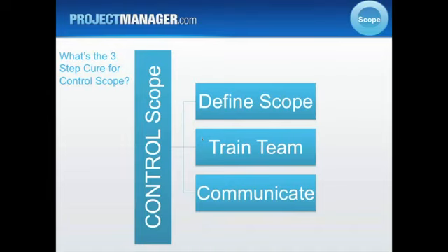Okay, good catch, because that was on one of the first screens. So it is important to distinguish the difference between the product scope and project scope. The product scope is talking about the features and functionality that characterize the product, the service, or result, whatever you're delivering from the project. So again, the features and functionality of the product, service, or result.